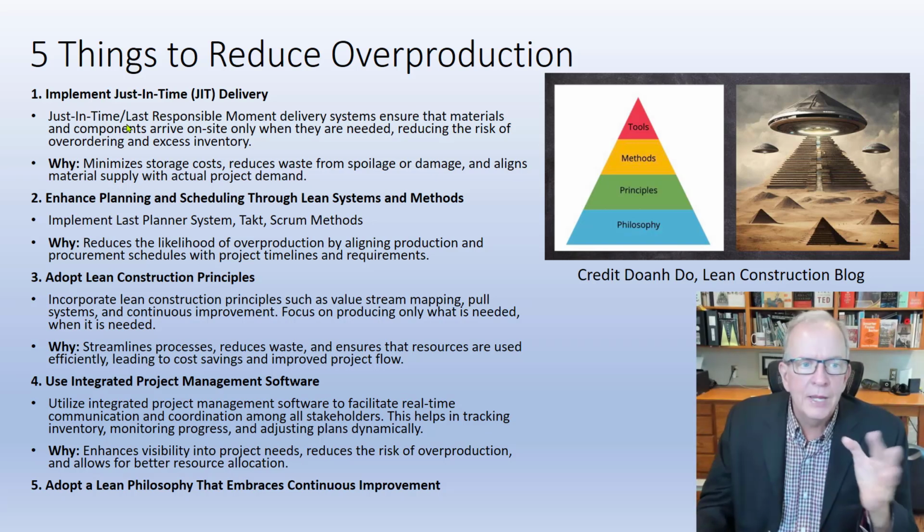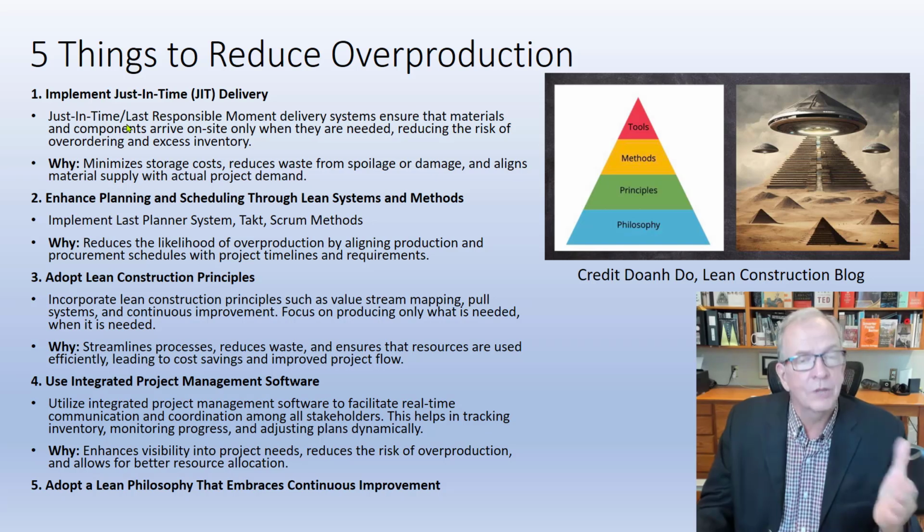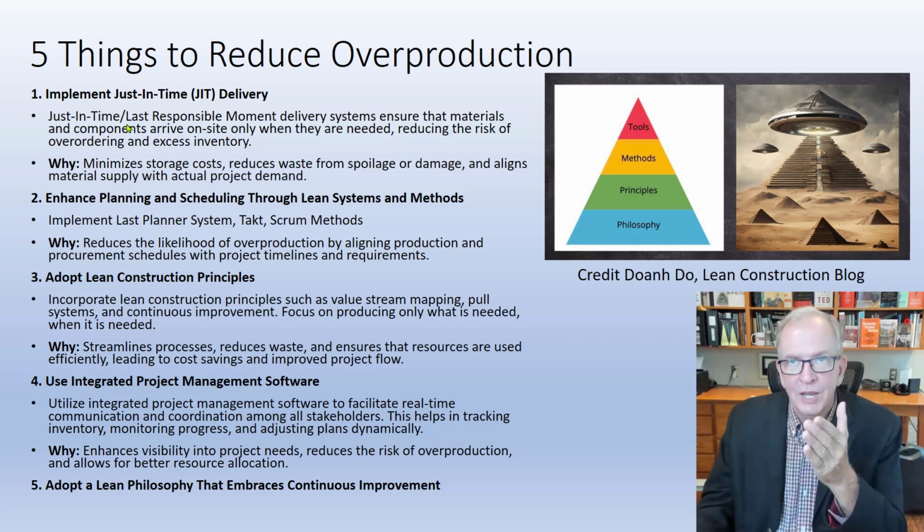If we rephrase that, which is often used in lean construction, last responsible moment means I'm assessing that particular situation. I want to build long-term relationships with my vendors and the supply chain, but for sure, I've got to look at what's the track record of this vendor? What's my trust level of it? What happens if I don't get it delivered on time?